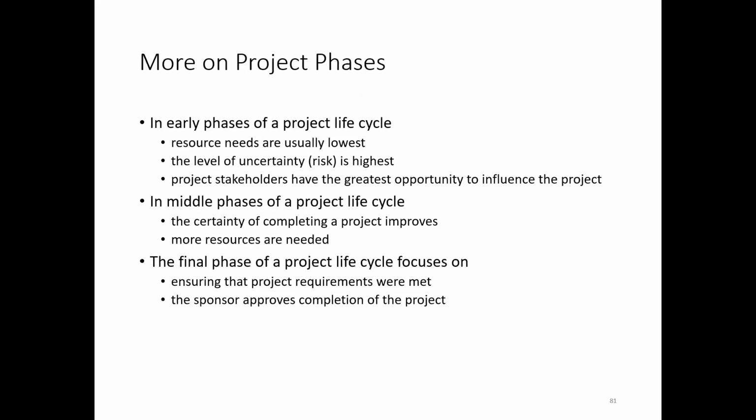And then we have more on project phases. In the early phases of the project life cycle, resource needs are usually lowest and the level of uncertainty is highest. Project stakeholders have the greatest opportunity to influence the project. In the middle phases of the life cycle, the certainty of completing the project improves and more resources are needed. And at the end phase, we ensure that project requirements were met, and the sponsor approves the completion of the project.